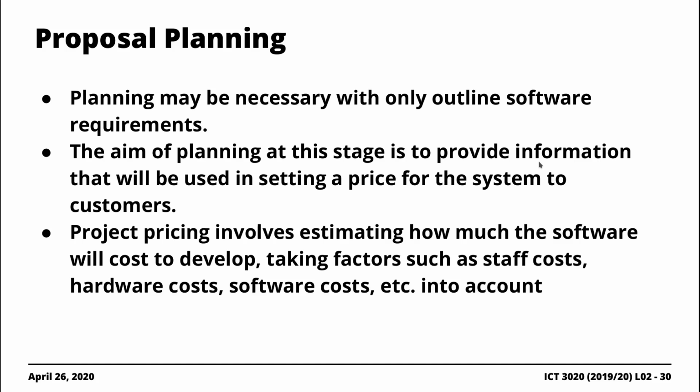What sort of hardware would you need? Are you going to need certain specialist software tools and components, CASE tools, right? Are you going to have to make a subscription to Lucidchart, or do you need some really fancy wireframing application, right? That would typically cost money. If that's the case, all of these things need to be taken into account when trying to estimate the price, right? And then the estimate is what you really tag as your price, right? When bidding for the project, for the contract,